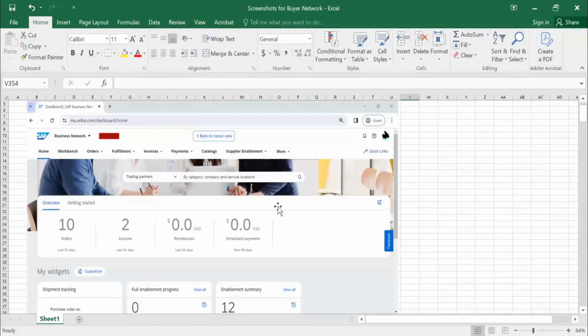Ariba follows the Activate methodology. Under the Activate methodology, there are 5 phases. The first phase is the Prepare phase. Here you are going to confirm goals, scope and rollout plan, and what SAP's responsibilities are and what the customer's responsibilities are. Standard deployment overview, provide project charter. This is either SAP or the consultant or the implementation partner company who will provide it. Then the next phase is explore.